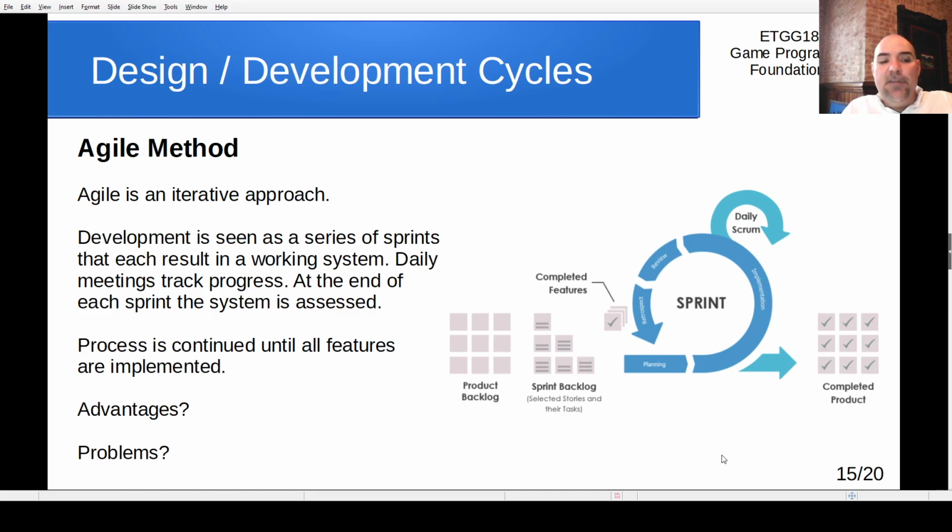The other disadvantage of this is it can be considered more problematic if you have an unskilled team of developers. For example, if one developer gets stuck on one part of that backlog and it holds up the whole sprint, then since this cycle feeds into the next cycle, it's going to delay the entire project.